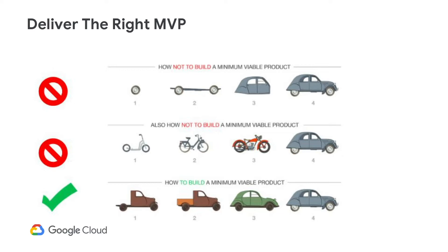The picture here shows three different ways to build a transport device over four releases with the business goal of getting from point A to point B. The first example should be avoided, which is building incrementally — after each release there's no business value, since we only get from point A to B at the very end in release four. The second example is better; it achieves the goal in each release with a working device, but forces the team to rework the product in every release, leading to a lot of waste and throwaway effort. The third example is the MVP approach: we can transport from A to B in each release, but we have minimal rework since we're building on top of the previous release's functionality in a smart sequence.